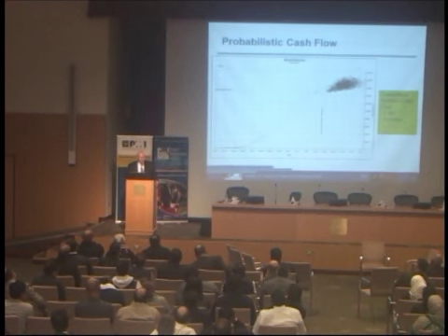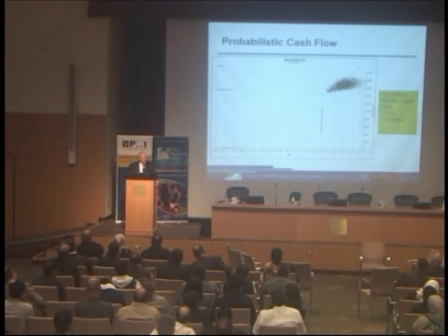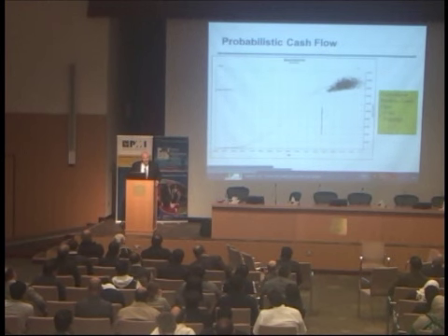And if you've got a yearly budget, let's say, and one of my first ones was on a decommissioning of a nuclear reactor, and I compared the risk-adjusted results to their budget. They had compared the plan to their budget and figured out that a couple of months they're going to be over, but really, on the whole, for the year, they're going to be okay. They're going to be over in 2 or 3 months and not much at that. But when you look at the 80th percentile, you find out that they're going to be over by 6 months, and some of that overage is going to be over $1 million. For this project, that was a lot of money.